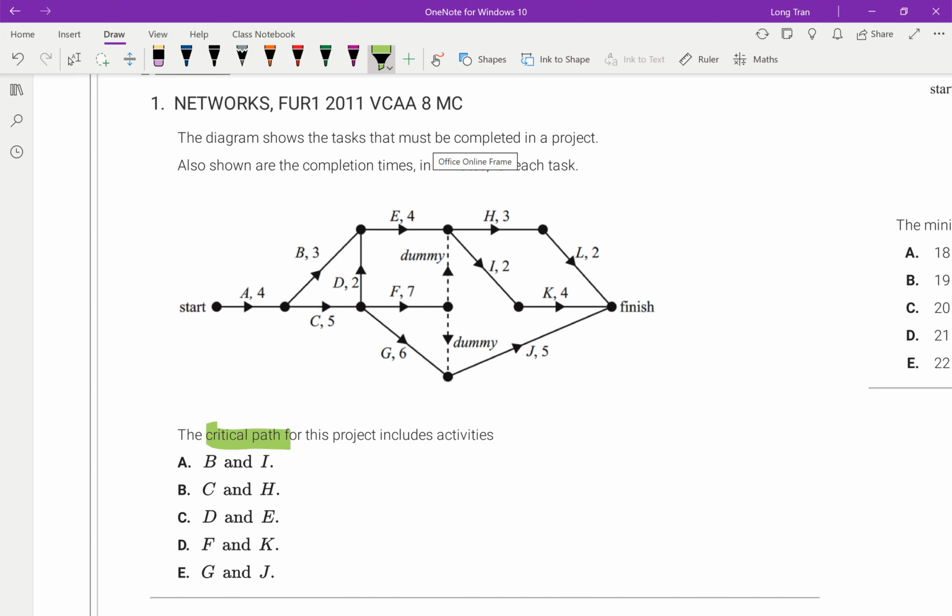for the project. And the way I've been teaching you today is I'm saying find using Dijkstra's algorithm, but the reverse, find the longest pathway, yeah? So this is how I would do it. I would look at a starting point. I would say that from here to here, that adds to 4. There is no other point or any other way to get there. So 4 has to be the best time I can get for the end of A.